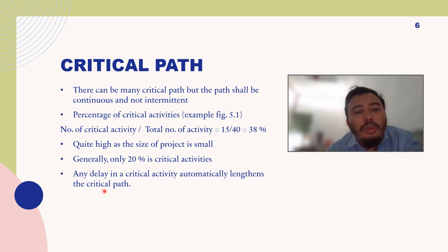So the way we can manage this is to change your sequence of activities, and also to add more duration on certain activities, if it is possible to extend the duration.